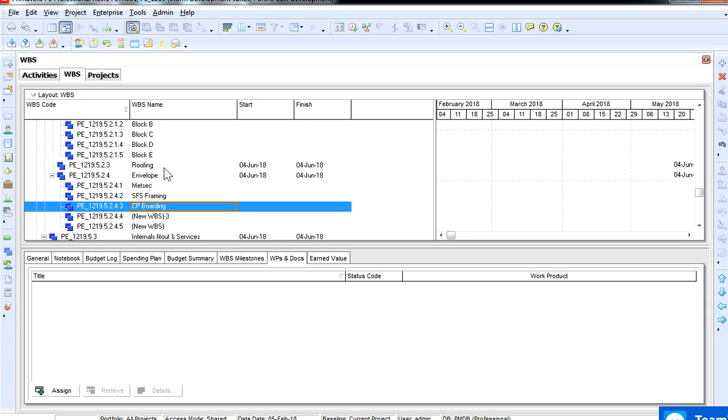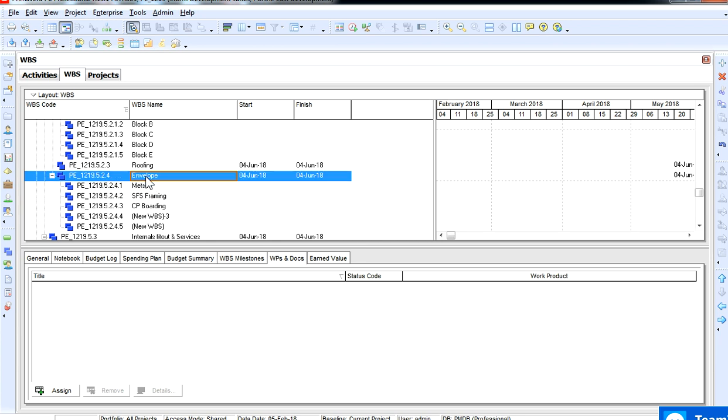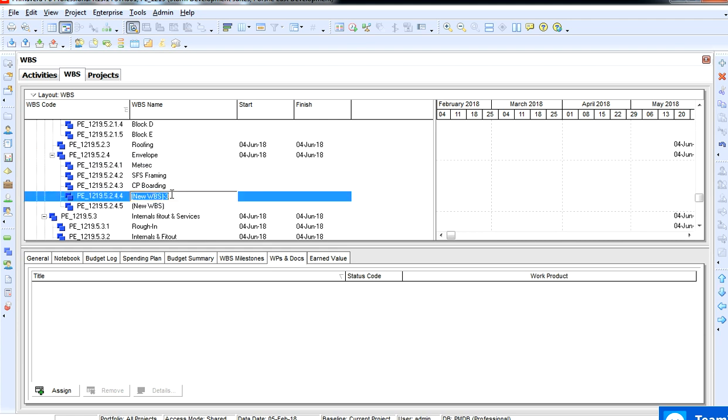So at this point, before you get to the envelope, you would have erected your scaffolding. Prior to the envelope, you would have a WBS for scaffolding. It doesn't have to include too many activities. Just put scaffolding and a long duration. You don't want to overpopulate the program with unnecessary activities that you won't need to track. Always remember that each of the activities you put into the program has a budgeted labor unit.